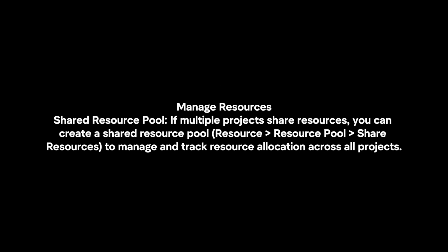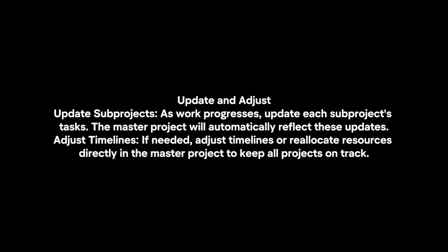Manage resources. Shared resource pool. If multiple projects share resources, you can create a shared resource pool to manage and track resource allocation across all projects.